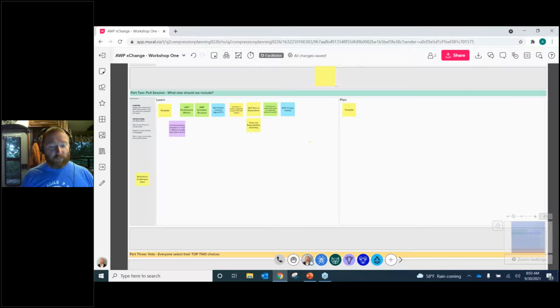I've worked for companies, I've worked on mega projects where the intent for the first implementation of AWP was just to be on time and on budget, because for mega projects, that's a resounding success, using AWP as a methodology to de-risk the project and stop it going over. So when we're looking at these ROI tools, we look at the organizational maturity. Is this the first time you're doing it? Because if so, we're not going to promise you the full savings the first time.